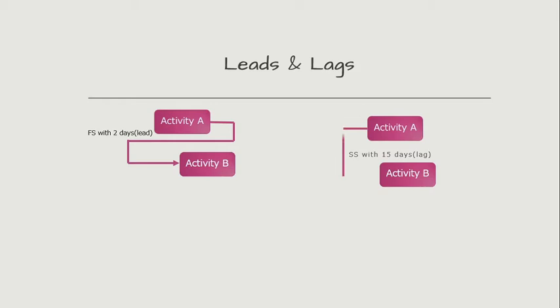Lag. A successor activity is said to have a lag when it needs to be delayed with respect to the predecessor. For example, activity B here can start 5 days after the start of activity A.